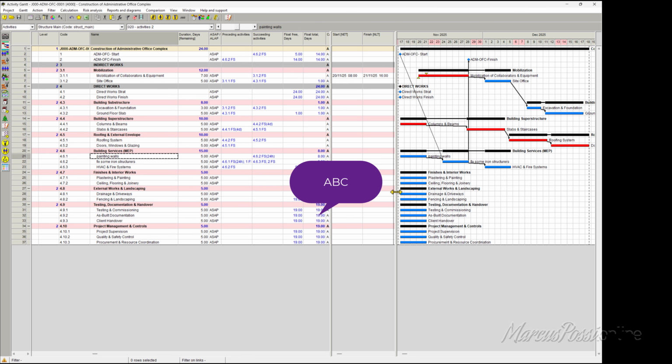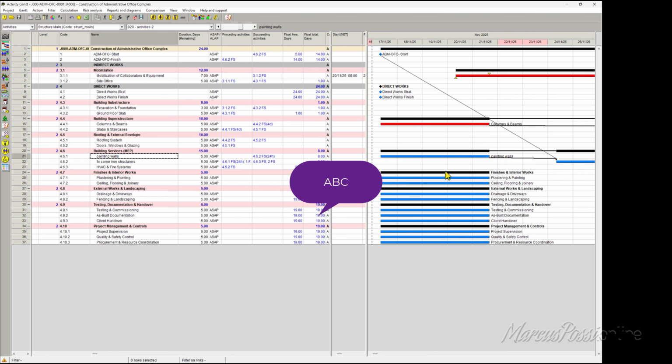But wait a minute. You finish at 16 o'clock and should wait 24 hours. That's right. But we have 2 days and 16 hours here because this activity must obey its calendar time.